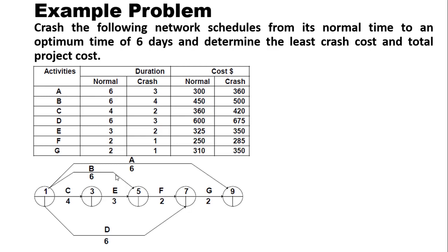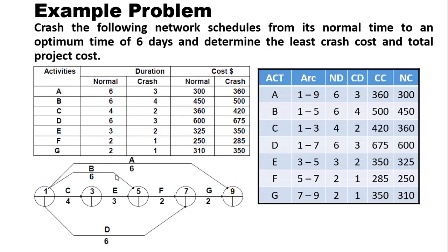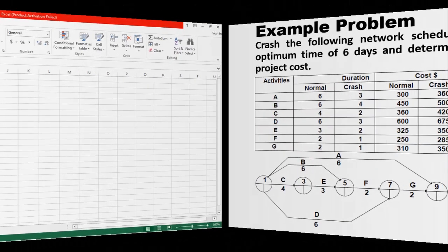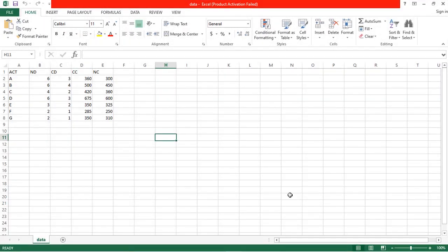We are going to summarize this information into a table with activities A, B, C, D up to G, showing the arcs for each activity as in the network diagram. We have normal duration (ND), crash duration (CD), crash cost (CC), and normal costs (NC). We take this table, summarize the information from the problem into an Excel sheet, and save it in CSV format. We are then going to load this data into our Python files.